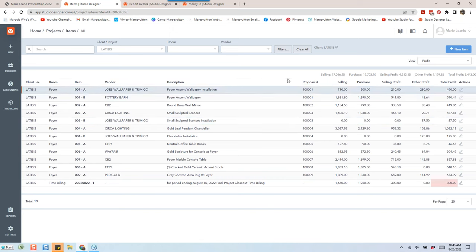The one thing that I want to make sure that you know is if I'm going to use the retainer, depending on if the client is going to freak out or not, and you guys know who those people are, I may document and send them something before I start to eat into their retainer. And then I make sure to document that, and I send it all to them. So then it's very clear, and if they want to talk about it, I just have them call me. But typically there's no misunderstanding.